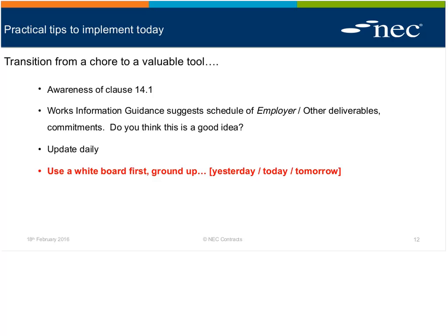The people who are keeping the program up to date take a little photograph of that whiteboard on their phone, scurry upstairs, update the Gantt chart. It's real time almost. That's probably the thing that's unlocked. You said toppest tip. Is that a defined term or needs to be one? I think we could make it a defined term. Okay.